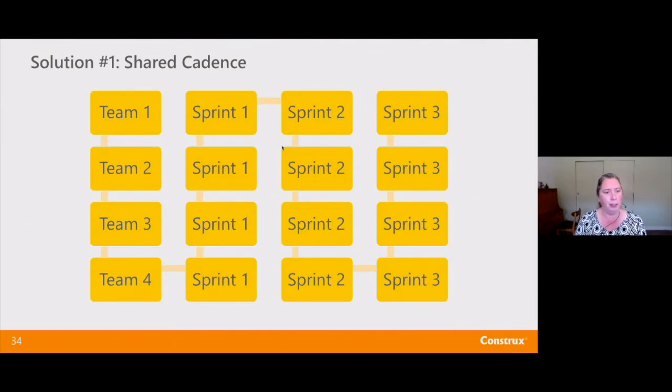One way we've been doing this for a long time, and all of the Agile frameworks have it, is the idea of a shared cadence. So we don't have teams who have different sprint cycles. Today, generally, when we're at scale, individual teams are on 2-week sprint cycles. That sprint cycle starts and ends on the same day across all of those teams so that we can make sure that we build upon that with a couple of product level events.